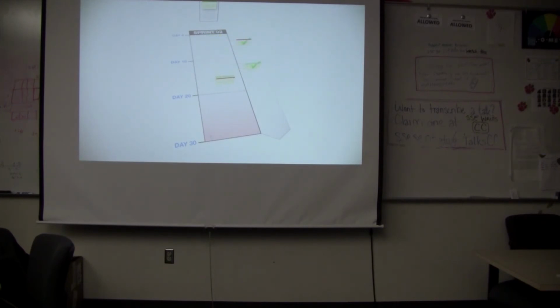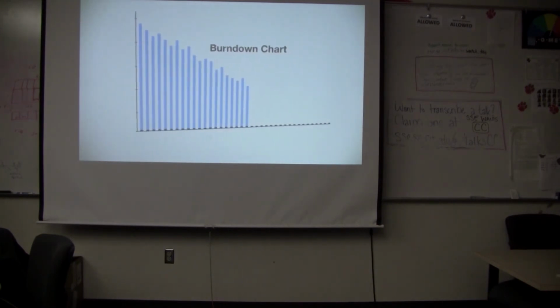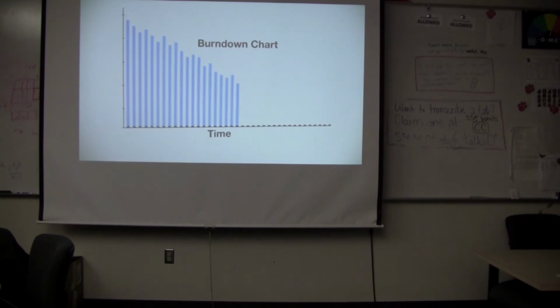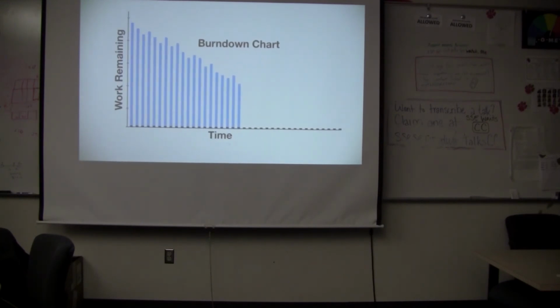Since sprints are a very short but realistic representation of part of the product, a late finish of the sprint is a great indicator that the project is not on schedule and something needs to be done. Therefore, it's extremely important to monitor the progress of each sprint with this, a burn-down chart. The burn-down chart is the number one reason for Scrum's popularity and one of the best project visibility tools to ensure a project is progressing smoothly.